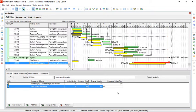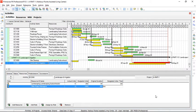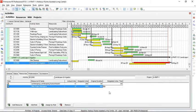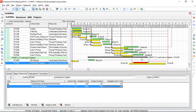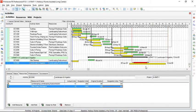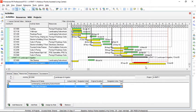And before pressing enter, have a look at the finish date of the activity. Currently it is 24th of May. We changed three hours per day to eight hours per day and press enter. As you can see, the duration has now been decreased. So this is the way to fast track activities, critical activities of any project.